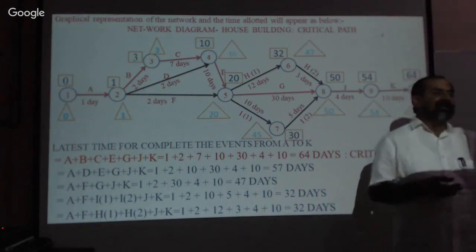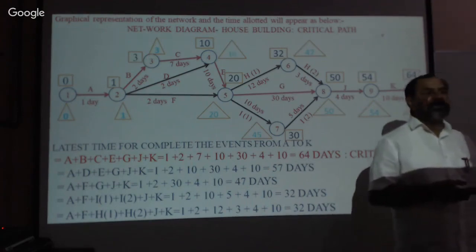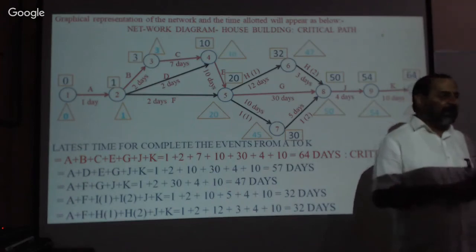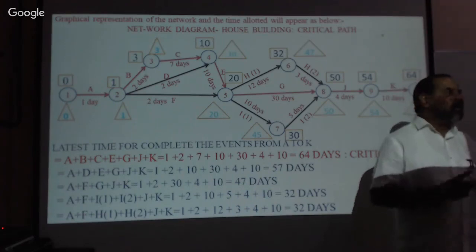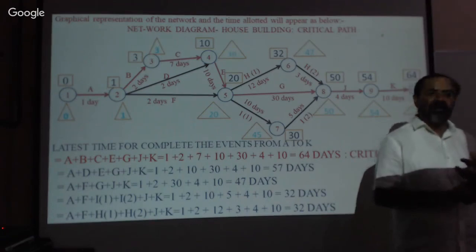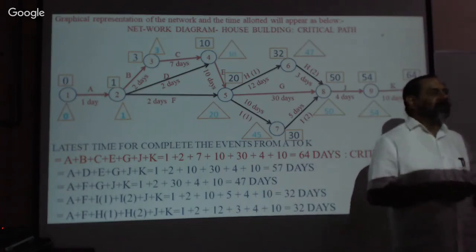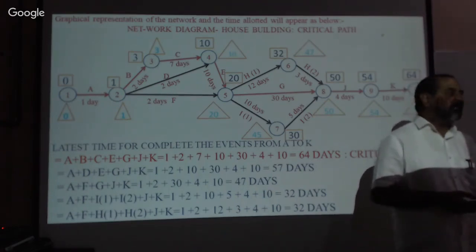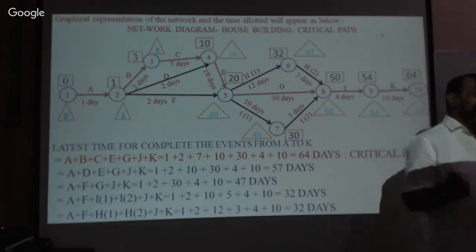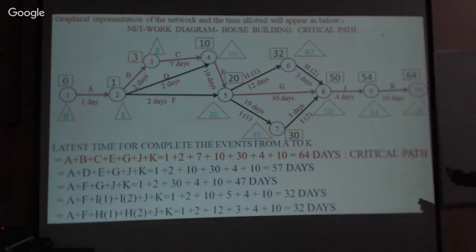No, you must do it like this only. Again, you want to become the force model. You are the engineer. You have prepared the drawing. You have prepared the design. You have prepared the specification, and you have identified the materials availability. You have identified the men availability, technology availability. Then you decide when you can complete the project and assign the time for each activity, then plot this network. Now this network diagram will give you the critical path and the minimum time required.